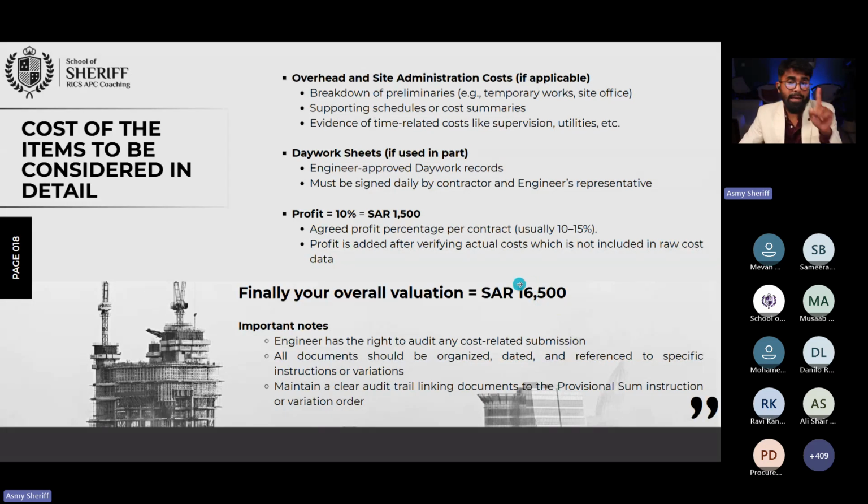And remember, guys, when we speak about actual costs, other than your agreed BOQ rate, if any rates that you are going to execute, the employer has the right to ask you to submit, has the right to come and audit, has the right to come and submit the evidence for the client's record. So this privilege will not go for a BOQ. If you are going to use the BOQ rate, do you think that the employer will ask you to submit, oh, right, okay, tell me how much actual?